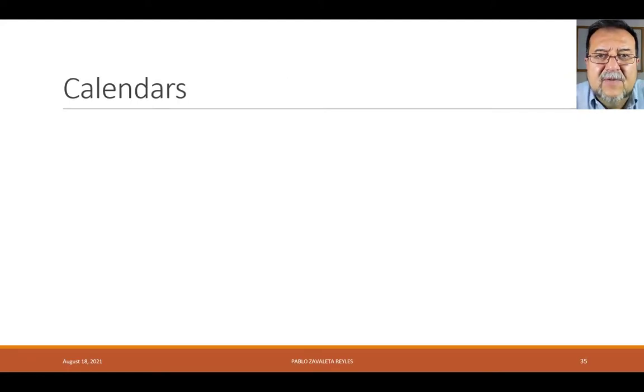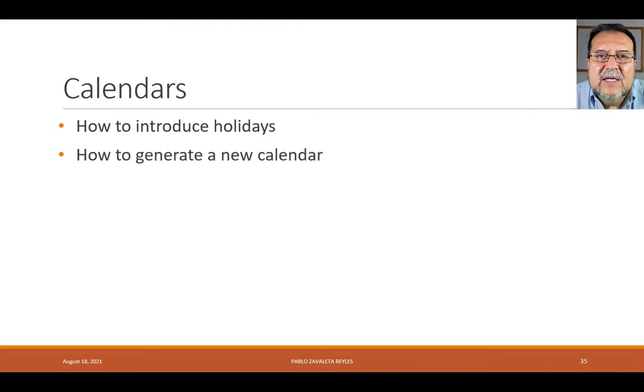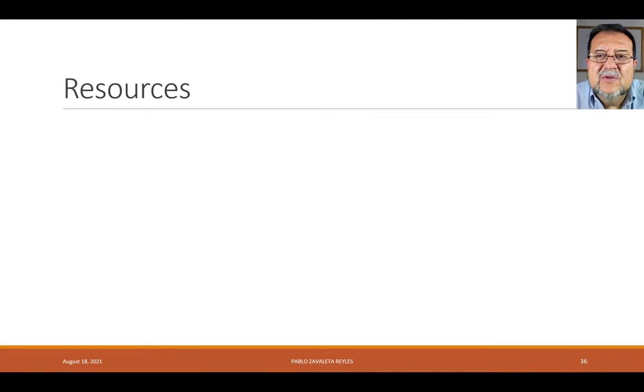In calendars, which is another aspect of the Microsoft tool, we can introduce holidays and we can generate new calendars, calendars that are specific to our needs. Let's say, for example, there are certain people who work only half shift. Or there are people who work weekends.